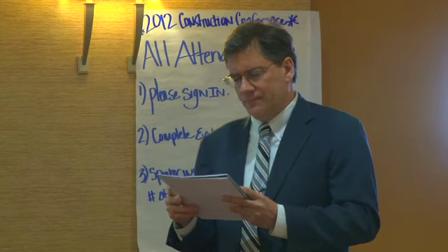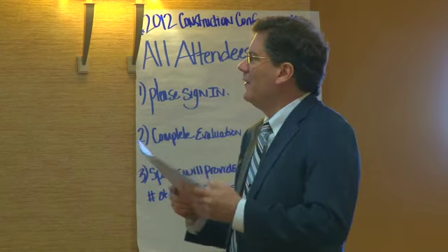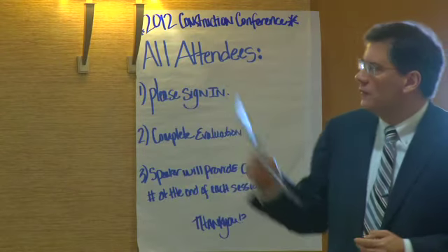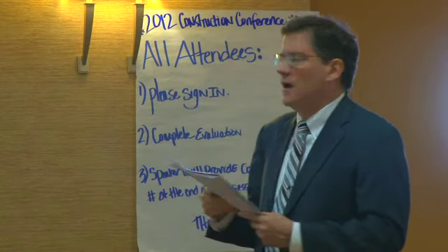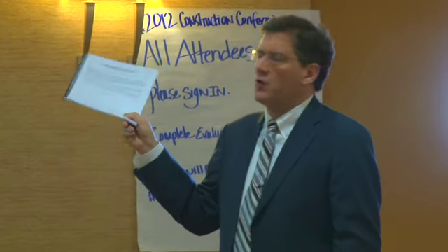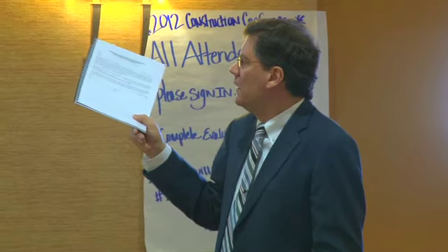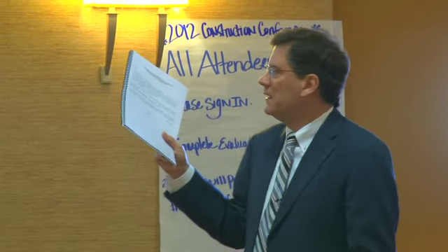Let's go to unconditional release on final payment. This is the big dog here. It looks just like the conditional release, but now this is the last money you're going to get on this project from the owner before you waive your rights to lien.